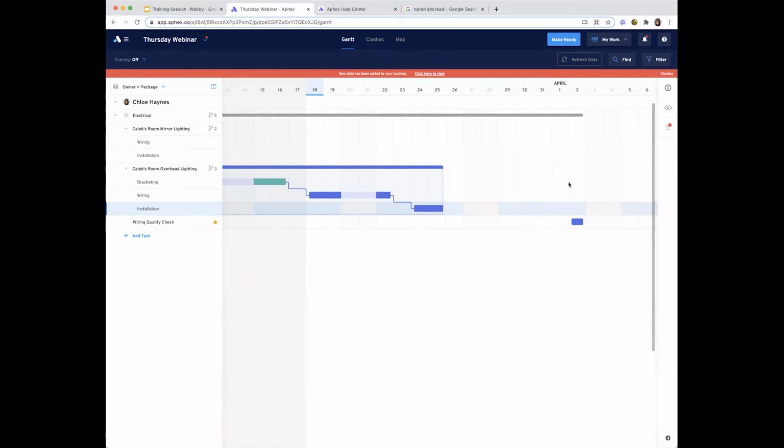So if your project is importing, or if you're thinking about importing, we'll go through that first, and then we'll go through bottom-up. If you've imported tasks and work, what will have happened is your planner will have done an import. Everything will have landed in an unassigned section, so it doesn't immediately populate the Gantt and lead to lots of confusion. They will have then gone through all of those unassigned imported tasks and applied an owner or responsibility for different ones. If you get assigned a task from an import, it's really obvious and I guarantee you can't miss it. You'll notice here I have been assigned some work.